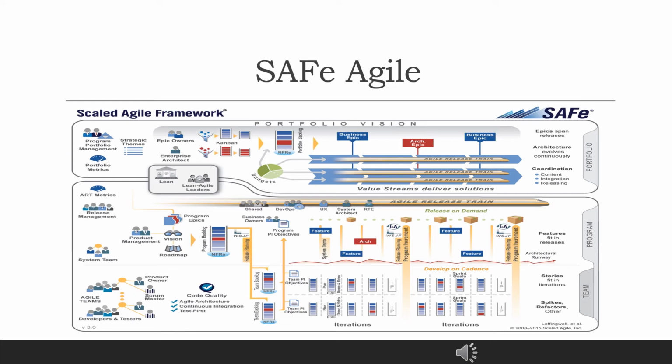So overall, a PI will be for 10 weeks with 5 iterations, where each iteration is 2 weeks, and we have reached PI1, PI2, PI3 and so on. Like that, if we have multiple programs we are taking care of them. So on an epic and portfolio level, in agile portfolio sometimes we also use Jira Align, and in Azure DevOps also. As a portfolio manager, we are keeping track of all the program levels, where we are, what all risks are there, what all issues are there, where the dependencies are, what all deployment we are doing, and what all releases we are doing.